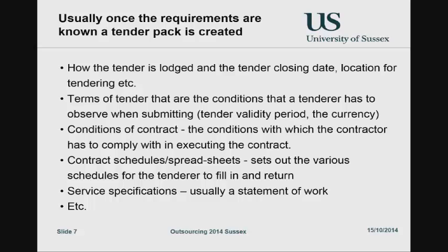In terms of tender, there are conditions the tenderer has to observe when submitting, so you've got to put all these things in there. For example, I am quite sure that if you're on the buyer side, when you're in the tunnel of making a contract, then the vendors, in this case, can only go through a nominated person. Yeah? Why do they do that? So in a normal tender or in a normal process such as this, you are not allowed to speak to anyone else other than usually the contract manager or the bid manager on the customer side. Why do we do that?